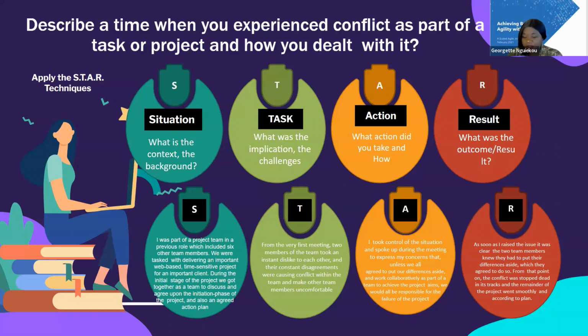And when it changed, it kind of made us off track because we had to be working on certain things, but actually we had committed to things that were different. Because of that, the team was not very confident. The confidence level of the team was low, and we had to find a comfortable way to handle the situation. So we worked with the product management team to agree on what needs to be released and to also review the PI objectives that we initially committed to.